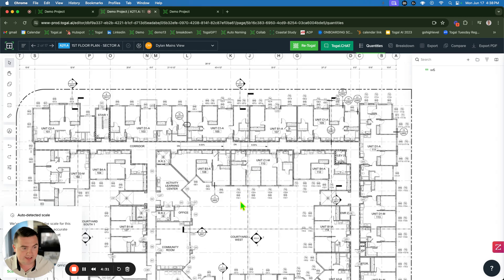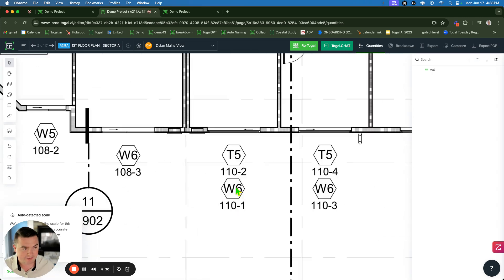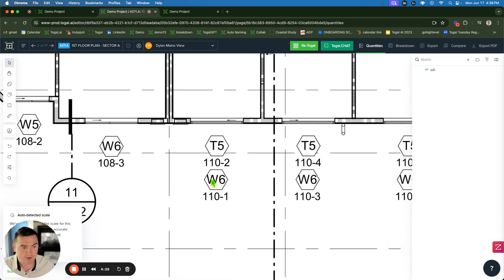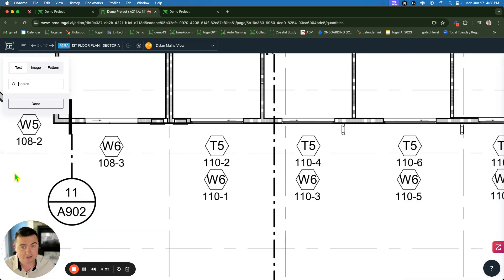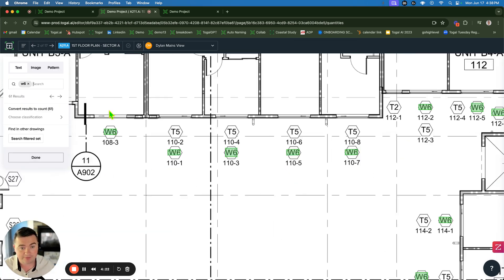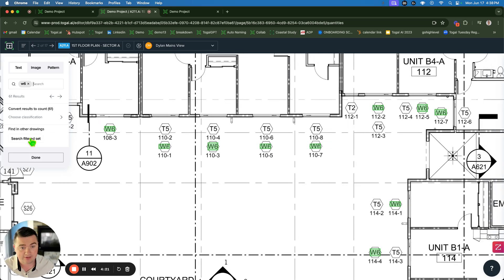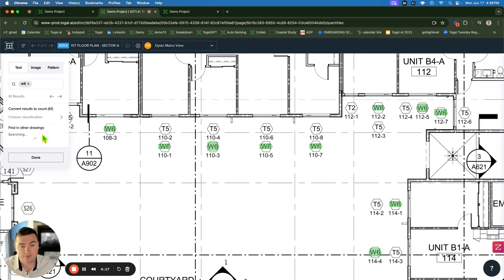And rather than coming in here and manually counting these one by one and then putting that in Excel to count and having to count them again, in Toggle we have text search. I type in W6. It's going to count all of them for me. Then I click search filtered set. We're going to search and count over 450 windows at once.